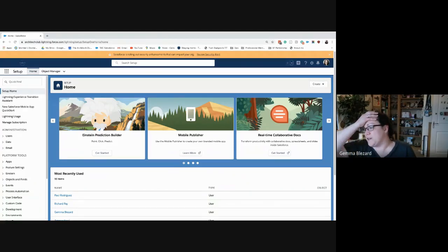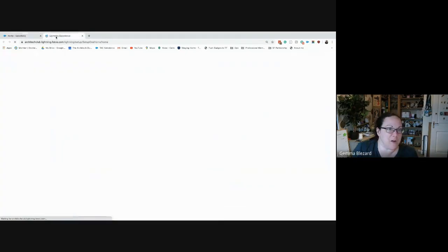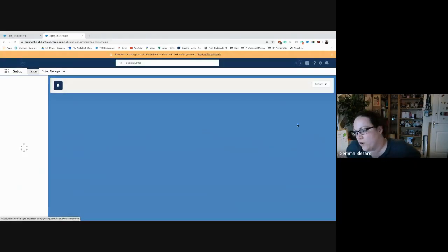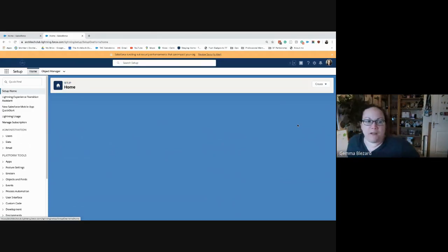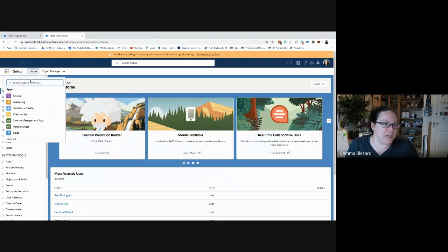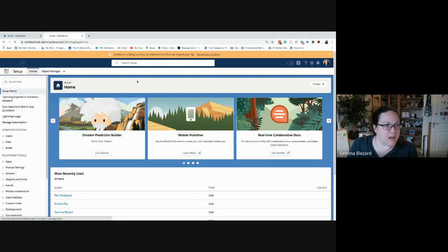Kat says, what's UAT? UAT stands for User Acceptance Testing. So if you build a flow and you want people to experience that flow, then you spend time building it, and then you deploy it into a sandbox, and then you get those people to log in and perform user acceptance testing. To do that, all they do is come into your homepage, and they look at the requirements that you've got in a special script, and they work their way through what you've built for them, and then they give feedback. Yes, I'm happy with it. No, I'm not. You need to completely change it, or could you just change this and that and the other a little bit so that it meets the requirements better. So it's the user's chance to actually assess what you've built for them.